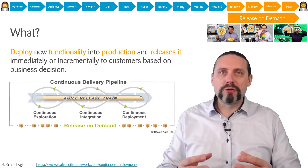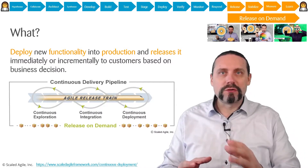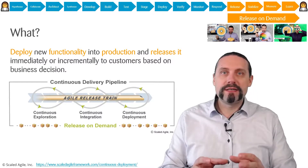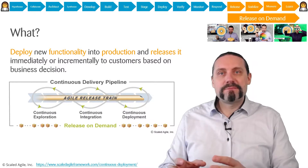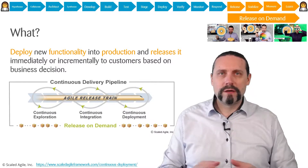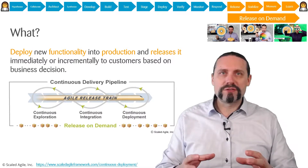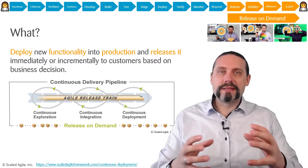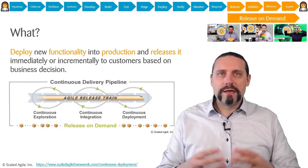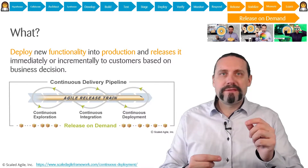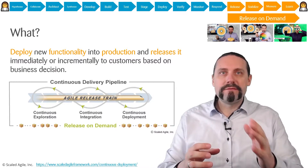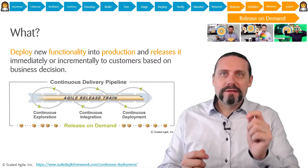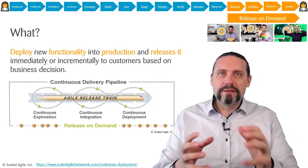We now continuously deploy our changes with the feature toggle off into production. After successful deployment we verify if everything is okay in production, taking a subset of tests we've already executed. We then continuously monitor our production server and build up alerting so we can respond to things that happen in production. This brings us to Release on Demand — we have continuously deployed new functionality with the feature toggle off into the production system, and now it's up to the business to decide when the time is right to release the new functionality to users.